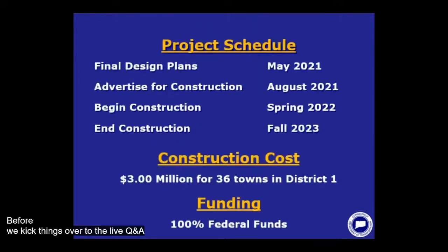Before we kick things over to the live Q&A session, I'll briefly talk about the project schedule just to give you a sense of where we're going forward in the project. Right now, we're expected to finalize all of our design plans and construction documents at the end of May of this year. Then we'll advertise the project out to contractors for its construction in August.